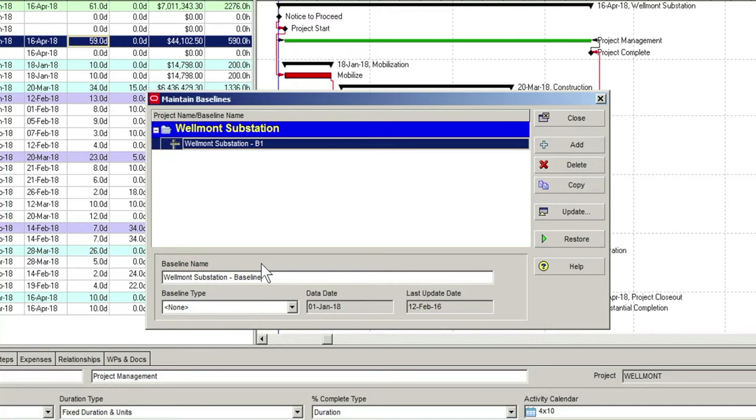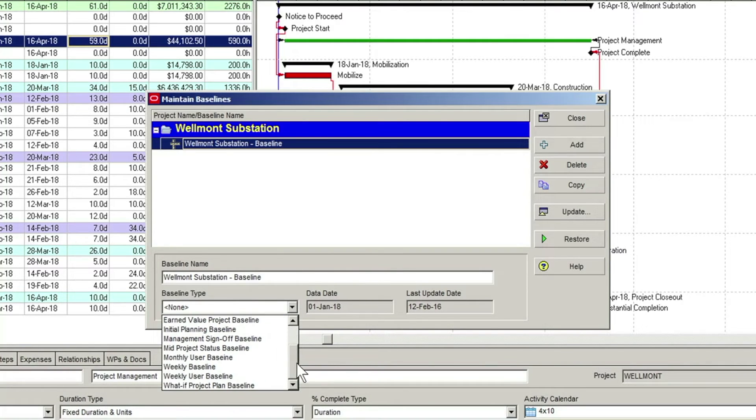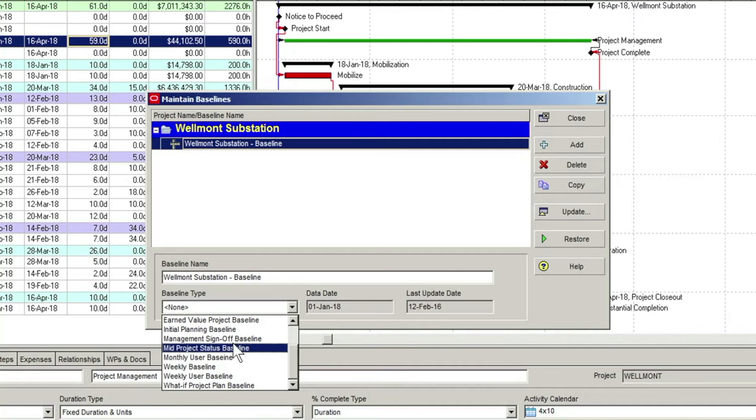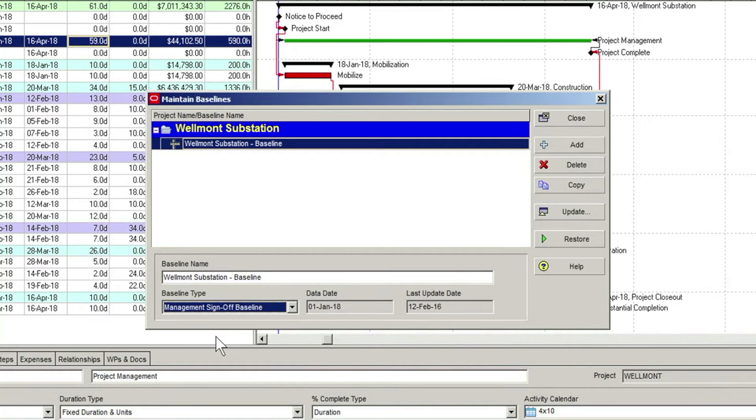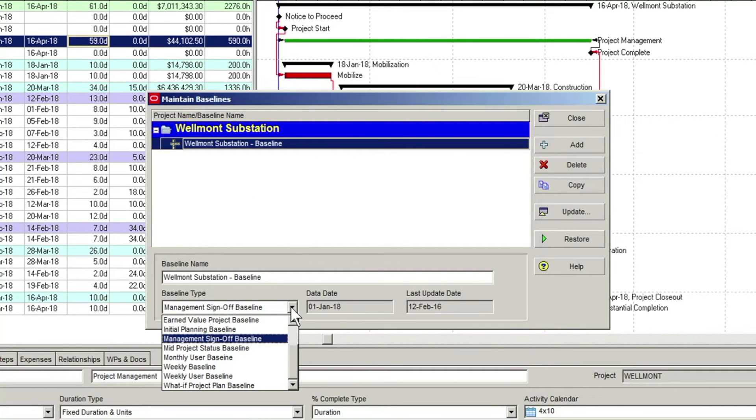There is also a Baseline type field, in which you can select from a number of predefined baseline types. These are simply labels you can apply to the baseline to help keep track of its purpose. For example, we will set our Wellmont baseline to a value of Management Sign-off baseline. Your list of baseline type options may differ from this, depending on how your admin categories have been set up by your system administrator.